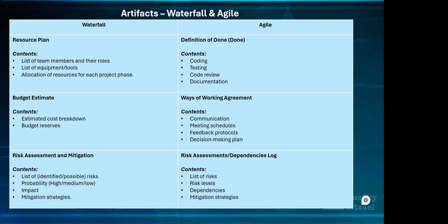So still using the example of the online bookstore that we're looking at, you're able to include things like maybe 20,000 pounds for design, 50,000 pounds for development, because we've put the resources down: the number of team members that you need, what you want to pay them, and how long they're going to work for. So you're able to have a total, a budget in place, to say maybe the developers are 50,000 pounds, testers maybe 30,000 pounds, and so on.